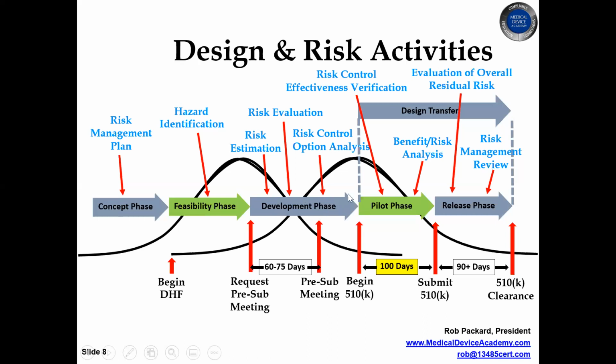Once you have a working prototype and you've finalized your design and you've estimated all the risks, now it's time to have verification begin. But before you do that, you do a design review here called a design freeze. And we call it a freeze because you don't want to make any more changes, because now it gets expensive. Now you're going to spend a lot of money for testing. That testing is design verification, but it's also risk control verification. During that phase, you might also start to prepare your benefit risk analysis.